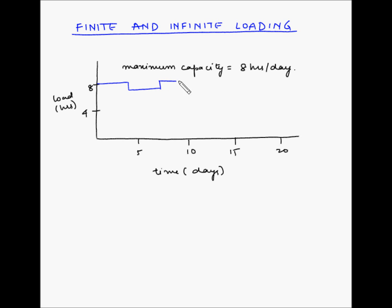Now infinite loading means overlooking the maximum capacity of a resource while assigning tasks to it. So if you take the same example that a resource has maximum capacity of eight hours per day, and if you assign tasks which are going to take ten hours or anything more than eight hours, then that will be considered as infinite loading. Let us draw the Gantt chart for infinite loading scenario.